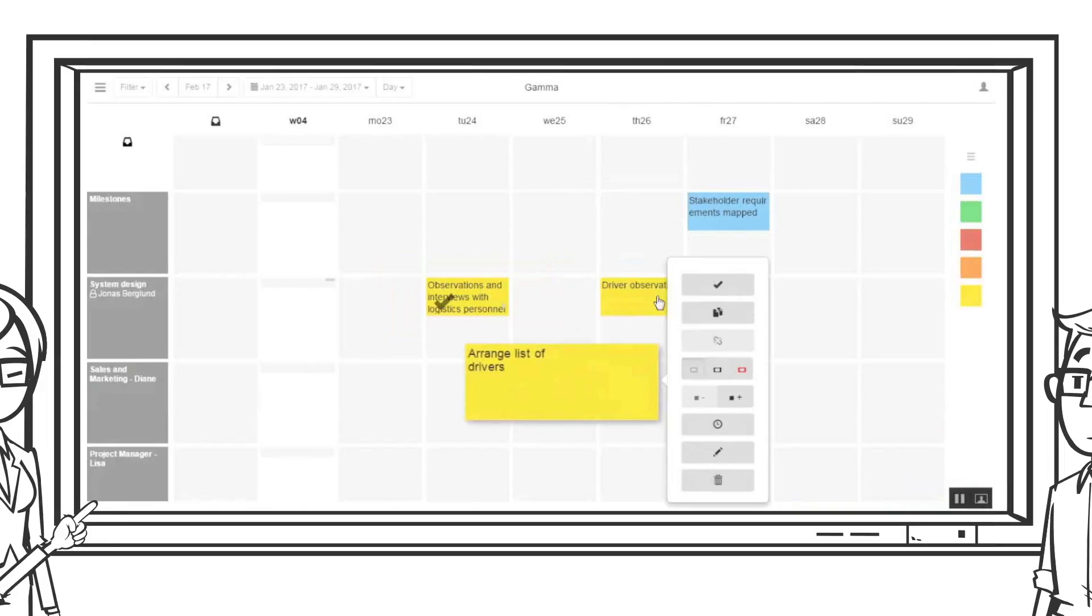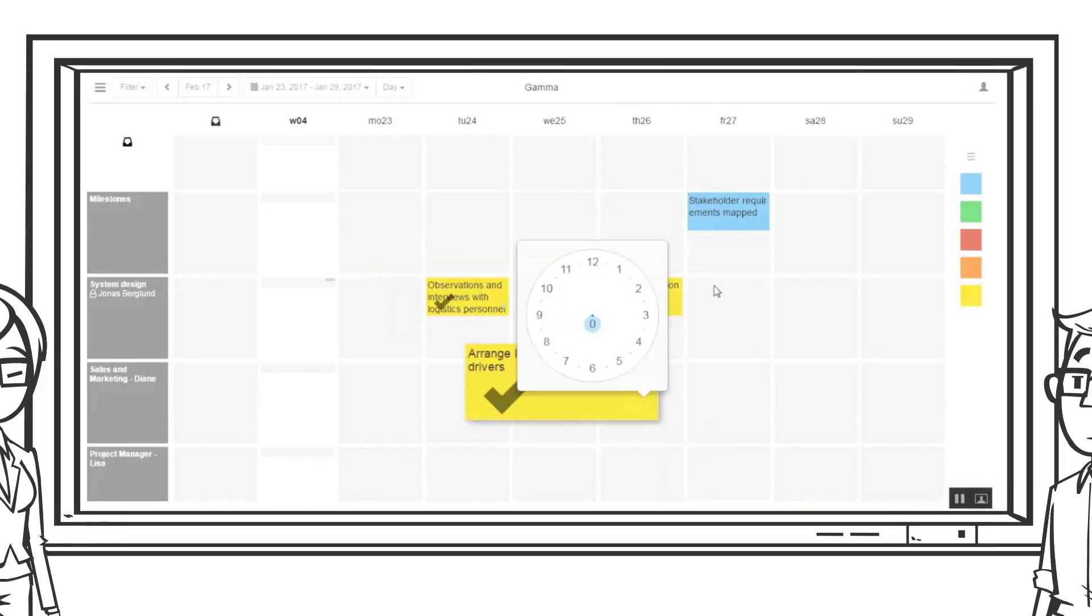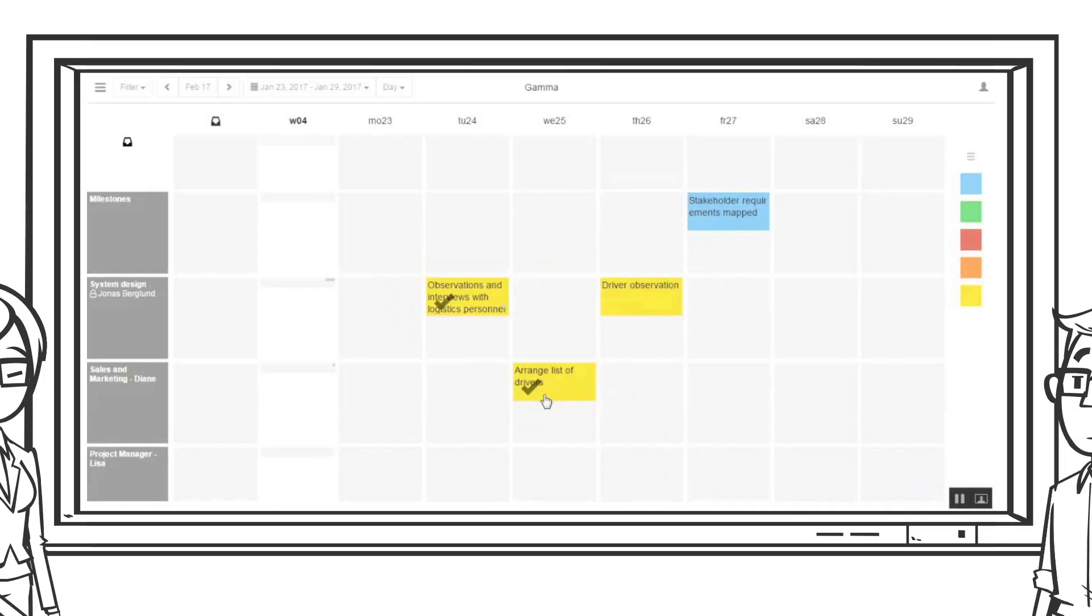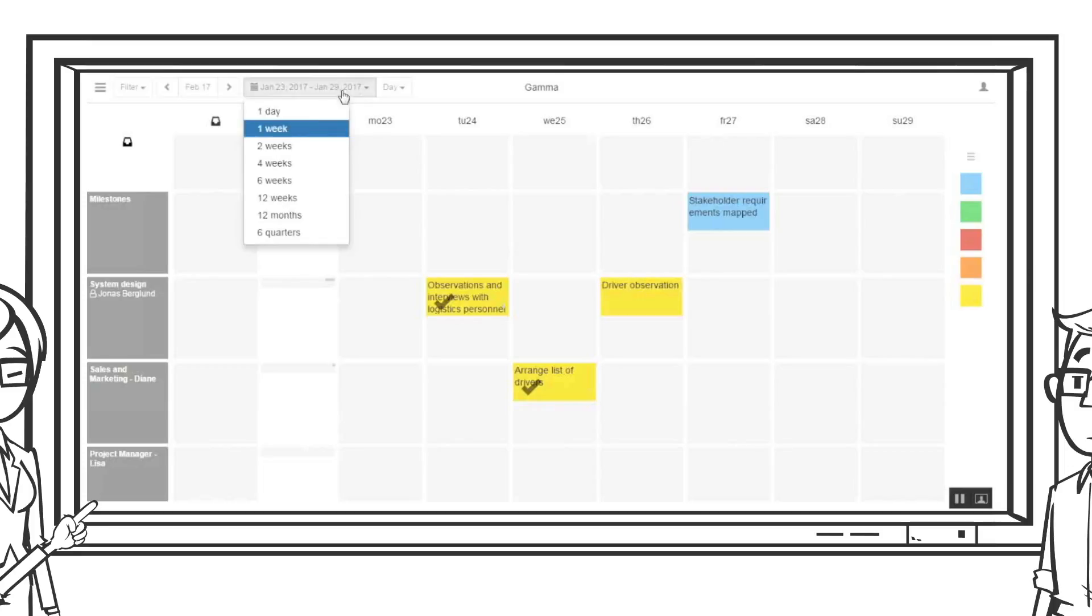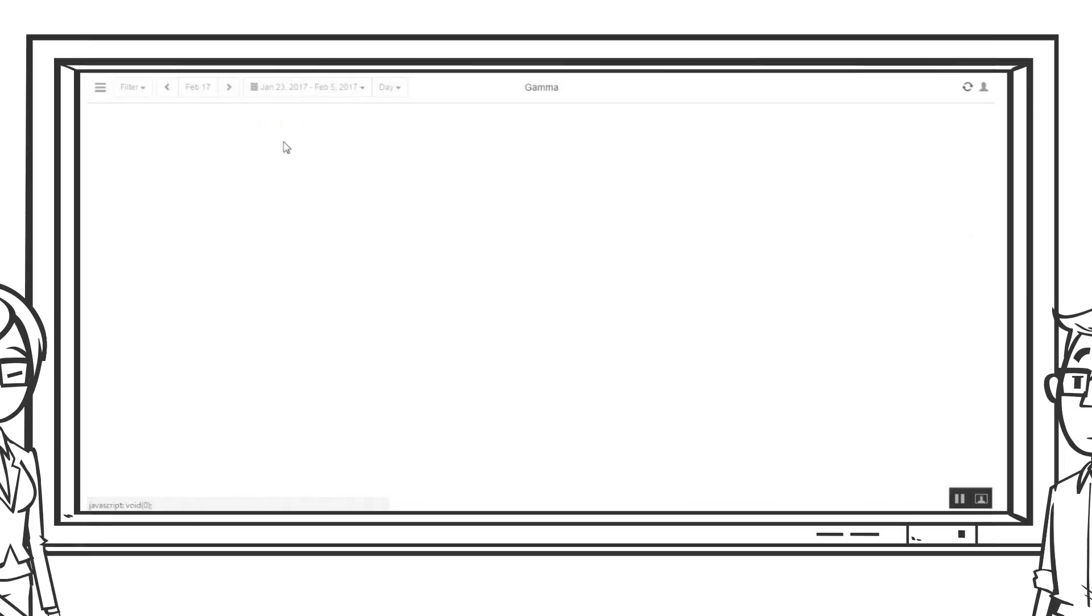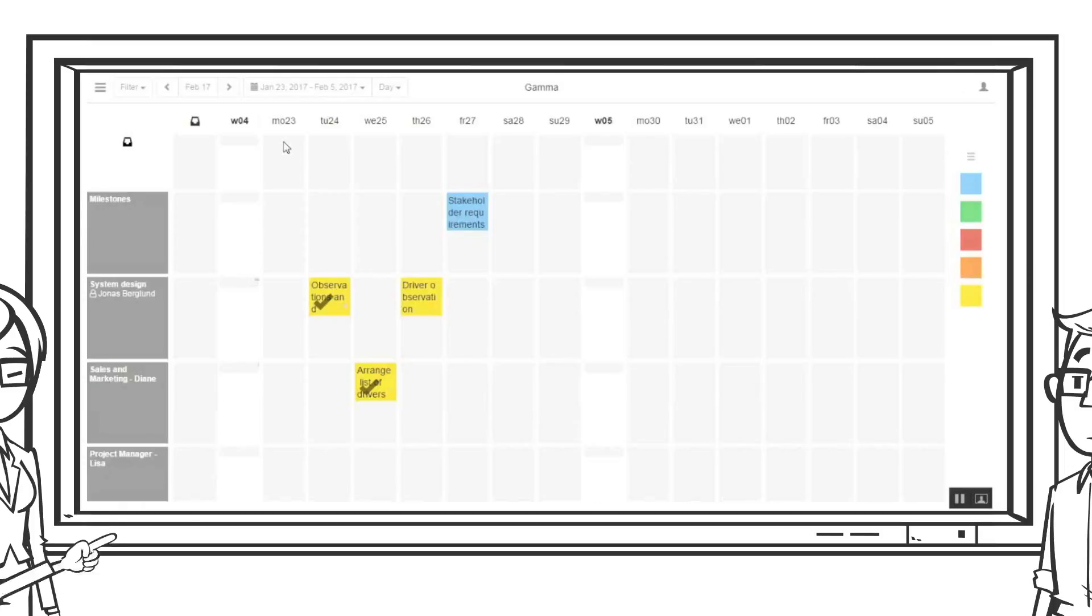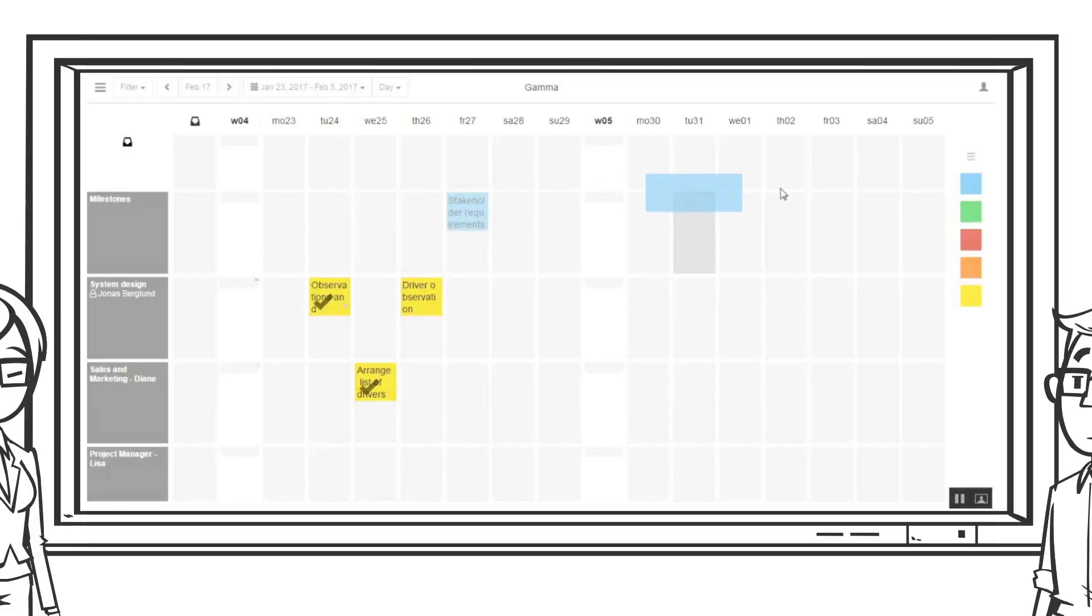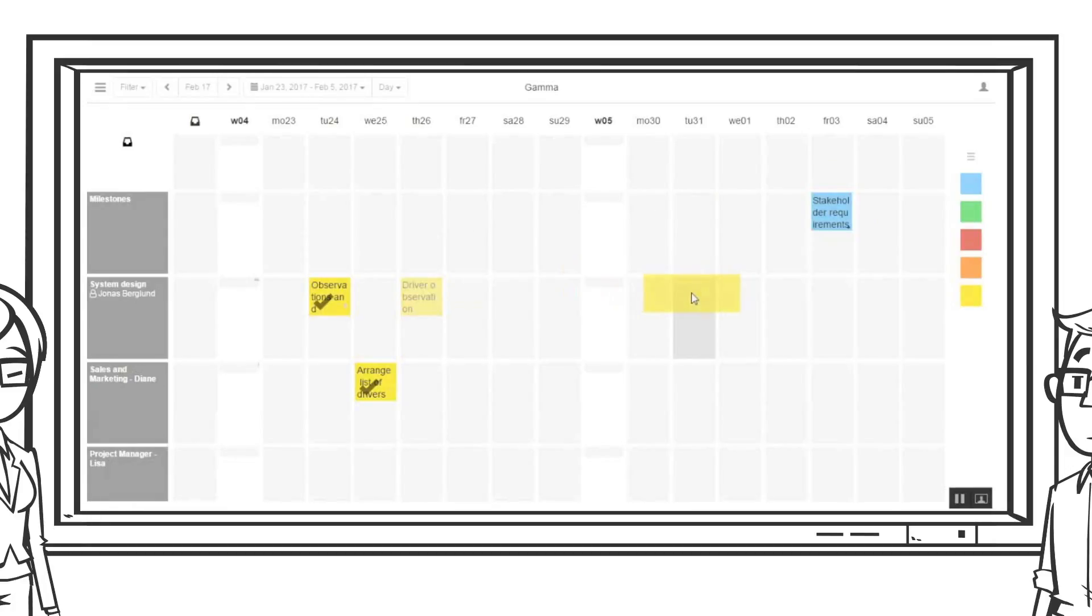Jonas marks his previous activity as done. Diane marks her activity as done as well. Jonas has to move the driver observation to next week as the list of drivers was late. He moves it to next week. This also means that the milestones need to move. Jolene's system helped to indicate this delay with a black dot.